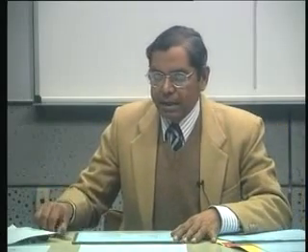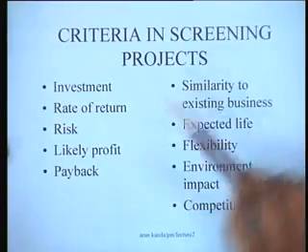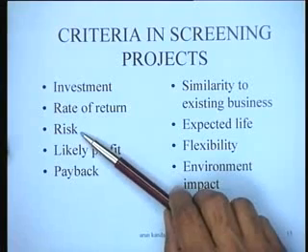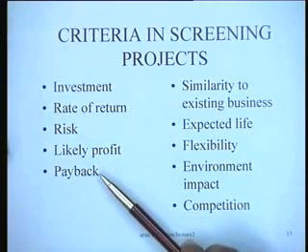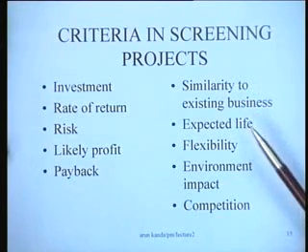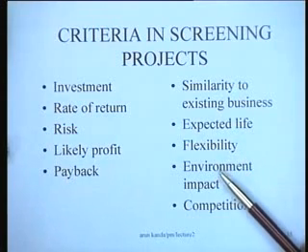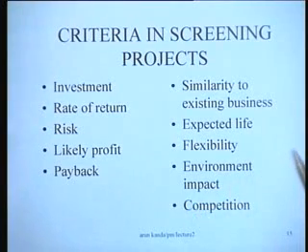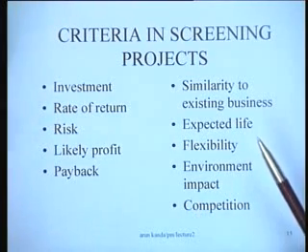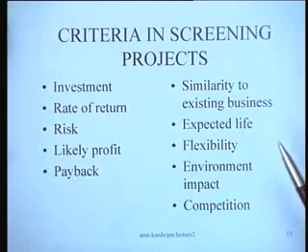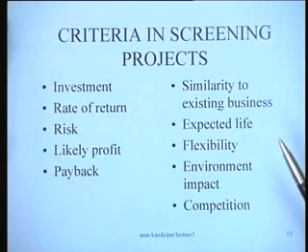Some of the important criteria that you have in screening projects could be the investment, the rate of return, the risk, the likely profit, the payback, similarity to existing business, expected life, flexibility, environmental impact, and competition. Of course, there could be many more criteria, but this is only a list that tells you that you could be screening projects on the basis of these criteria, and you could do this kind of analysis.